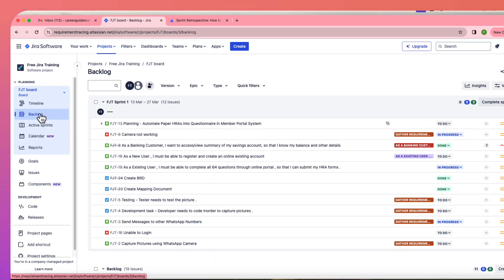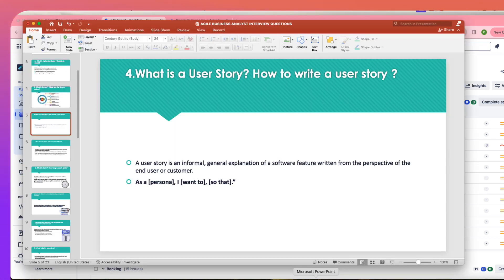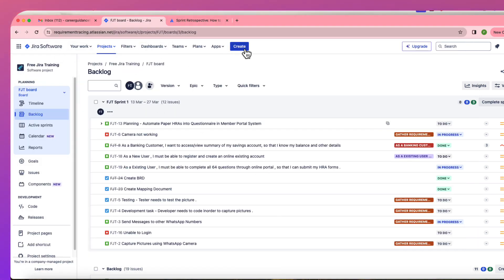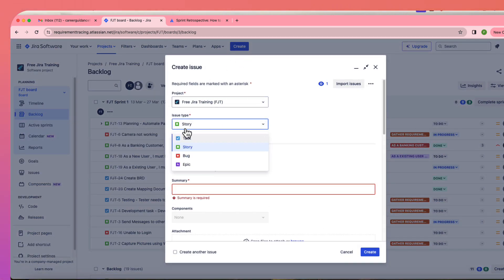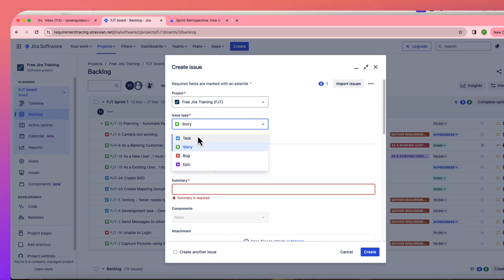Once a user story is created it goes to the backlog. The next question is: how are user stories, epics, and tasks different? In Jira software you have many types of issues — stories, tasks, epics, and bugs. These four are called issue types in Jira, or issue types in Agile.